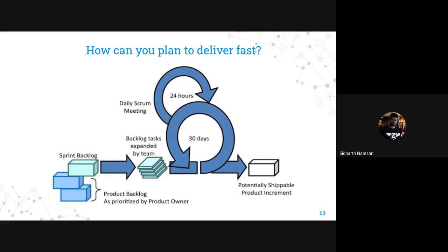When someone says this backlog item is done, whether it is a designer, a software developer, or a tester, it means all the activities in the task are completely done. There should not be any further questions raised. Many people say the task is done, but only 10% of the work is pending, or only the testing is pending. That means it is not done based on the rule.